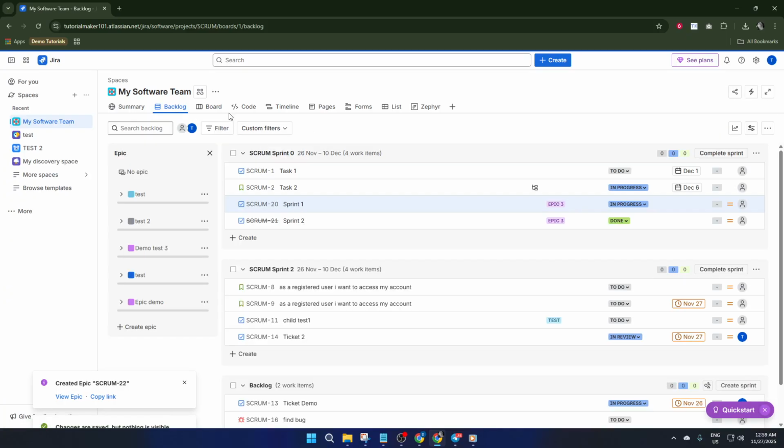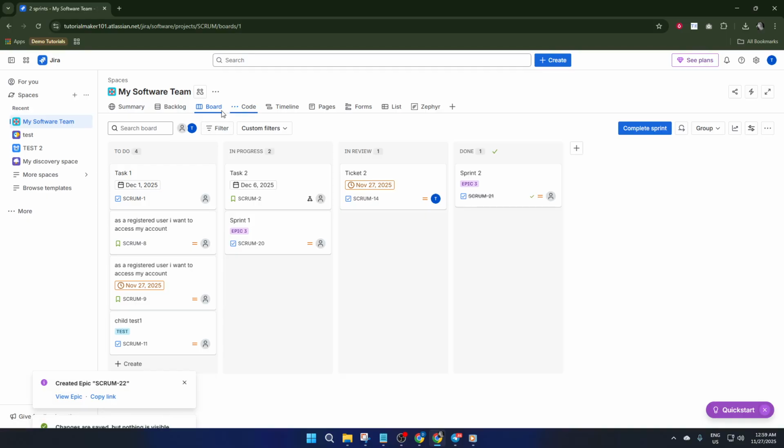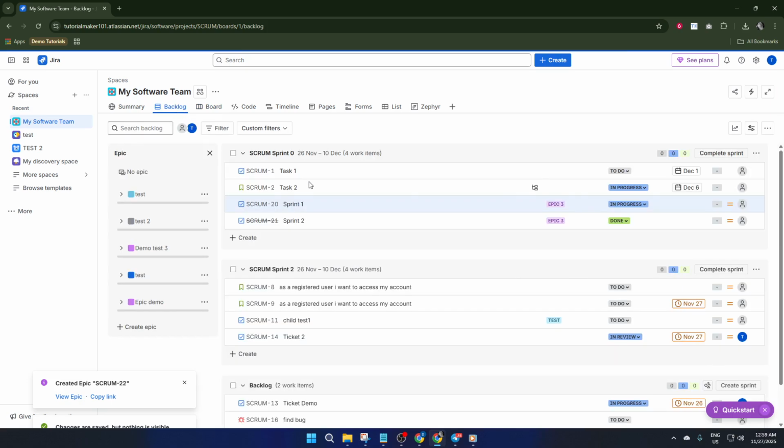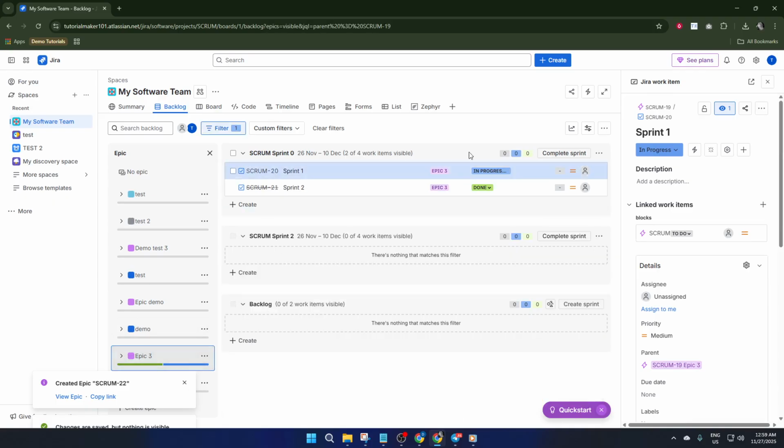Finally, you'll want to refine your workflow and report on your progress. Jira Query Language, or JQL, is a powerful way to create filters to slice and dice your backlog. For example, you can build a filter for all work assigned to me, so you only see what you personally need to tackle, or for all items in testing to keep tabs on code waiting for feedback. Save these filters so they're just a click away, and use them to generate custom reports that you can share with your manager or at team meetings. Whether you need to show off completed features or identify bottlenecks, these reports turn your day-to-day Scrum updates into tangible progress. And that wraps up our guide on how to use Jira as a developer.